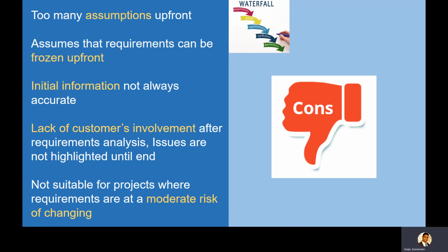Assumptions are made upfront because gathering all the requirements about the project upfront becomes difficult. So whatever is not clear, assumptions are made and documented so that later it doesn't become a point of concern or disappointment between the two parties. But these assumptions later pose more risk for the project, because on the basis of these assumptions, complete requirement, design and development is being done. It's an assumption again that requirements are frozen.